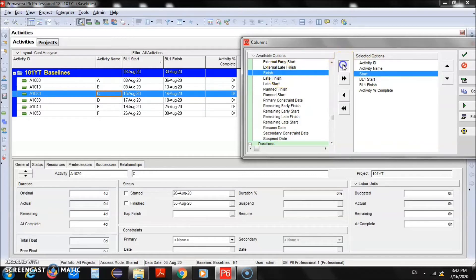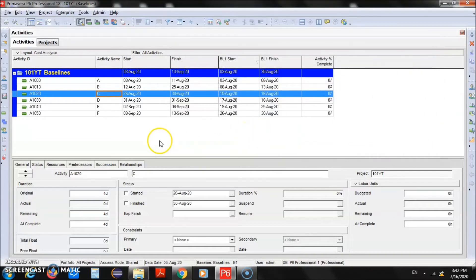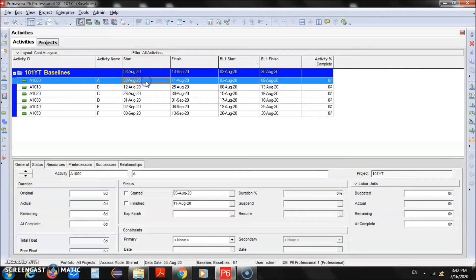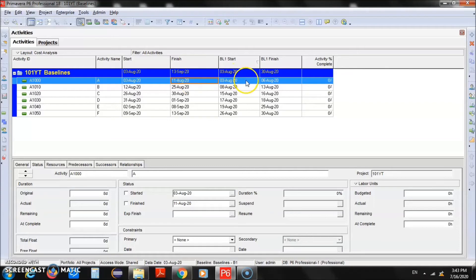Now you can see that for Activity A the start date is 3rd of August and the finish date is 11th of August, whereas in the baseline it shows 3rd of August with finish on 6th of August. The baseline has not been updated — it still shows the old dates. The project dates have changed to reflect the increased duration, but the baseline still uses the old dates, which could be a problem during execution if you are following the old baseline. B1 is no longer valid.